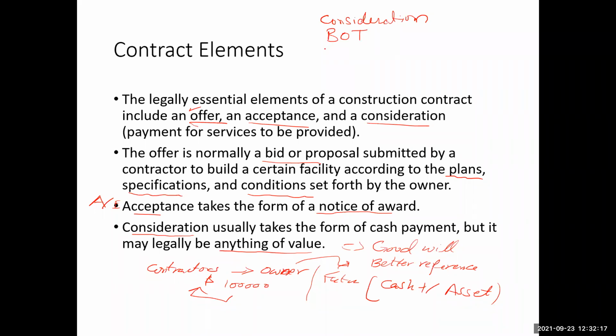In which the contractor will build the project, after that the contractor will also operate the project, and then after some time the contractor will transfer the project to the client. So in this case, the consideration from the owner will be in the form of the project itself.